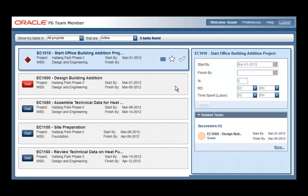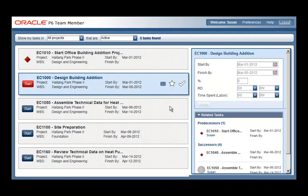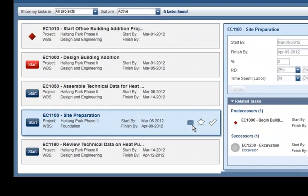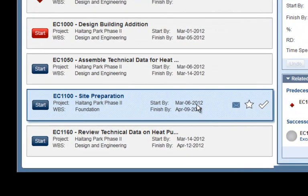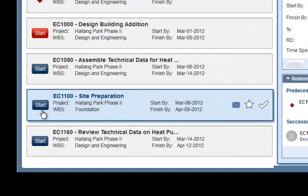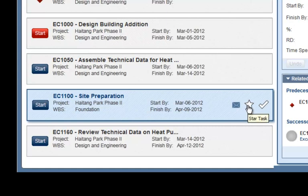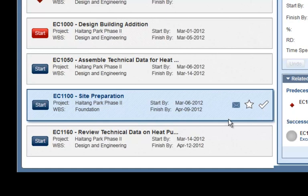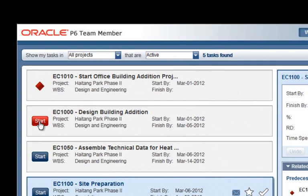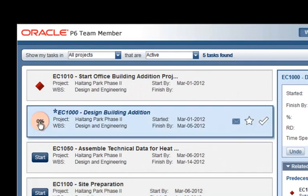In the team member web application, the team member sees their assigned activities represented as bars. Each bar provides details about the activity date and the WBS it belongs to. It also has a start button, email icon, star icon, and a check icon used to mark the activity as complete. If the activity is critical, the start button will be red.